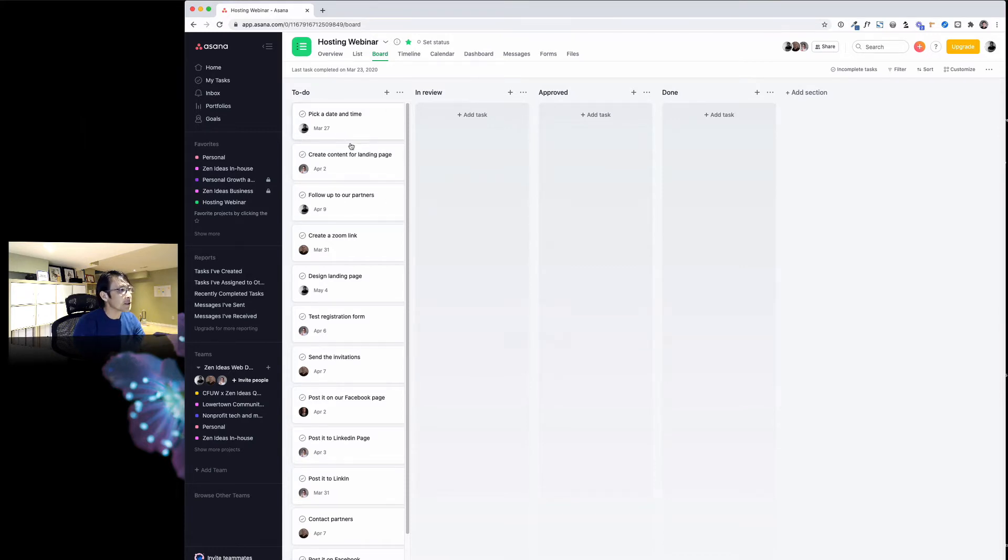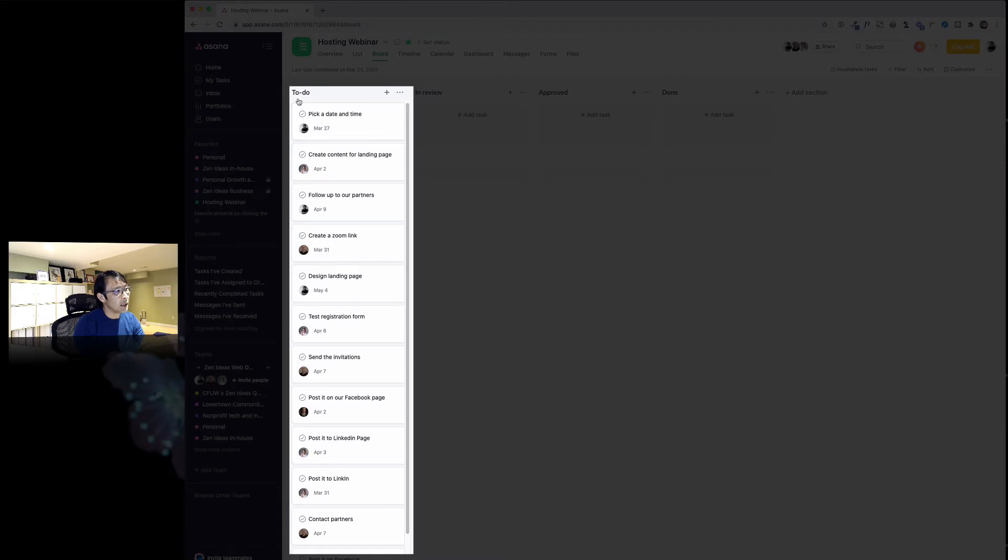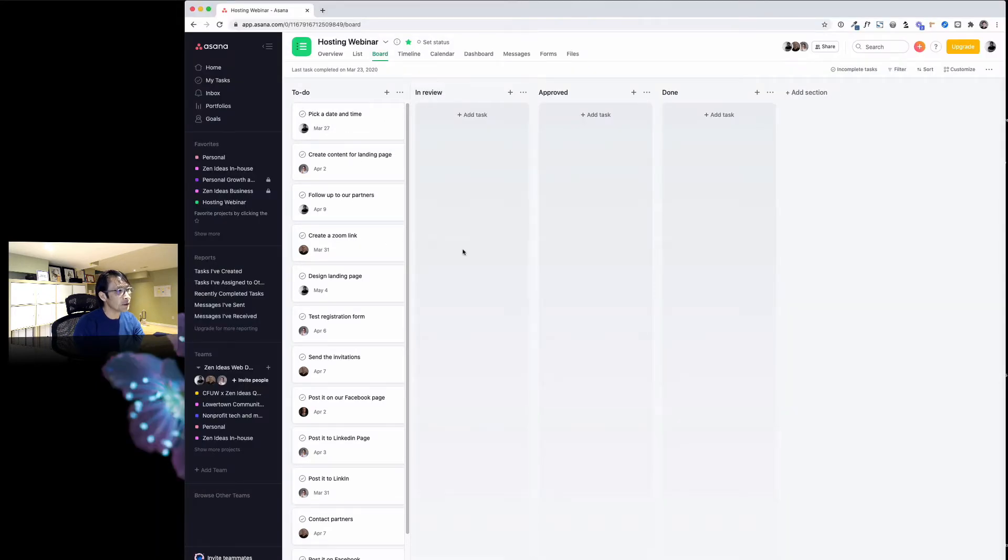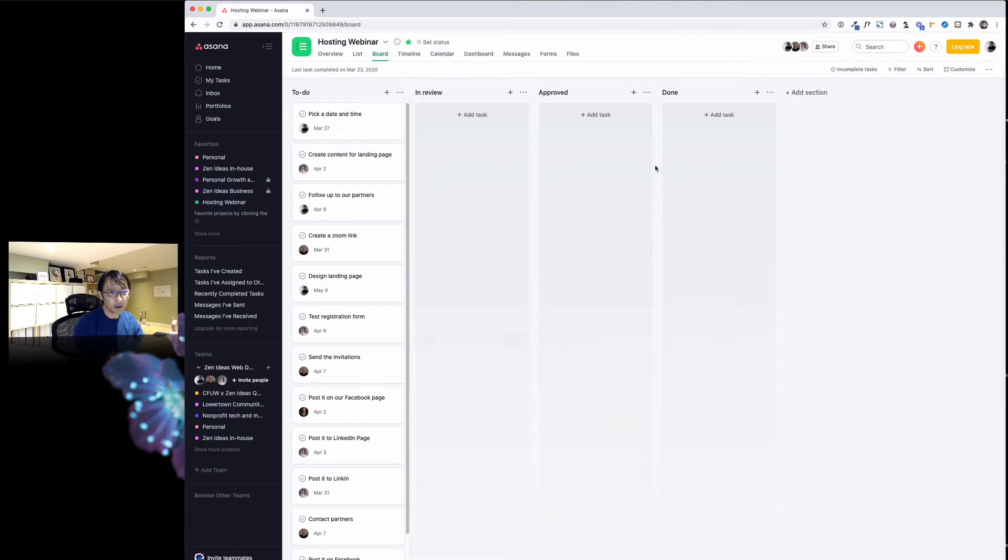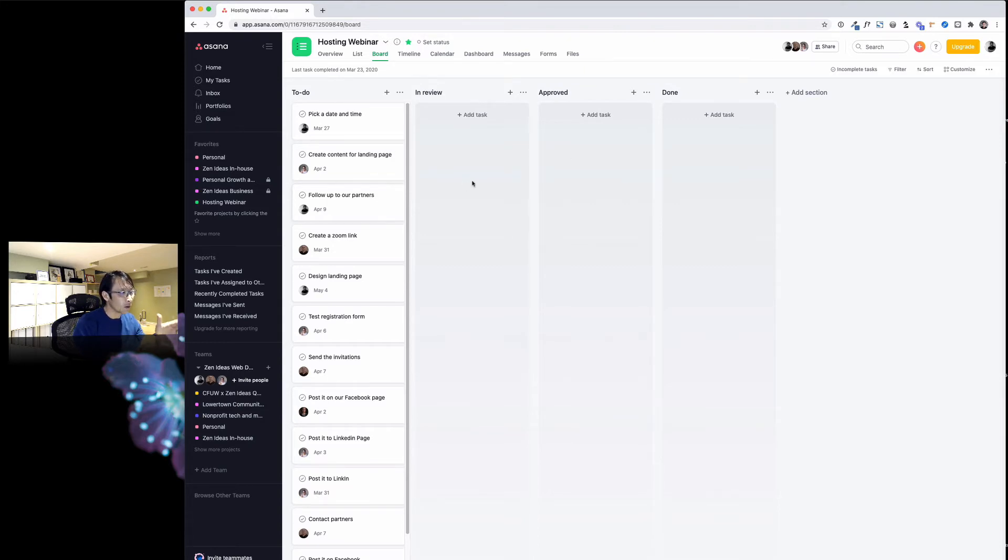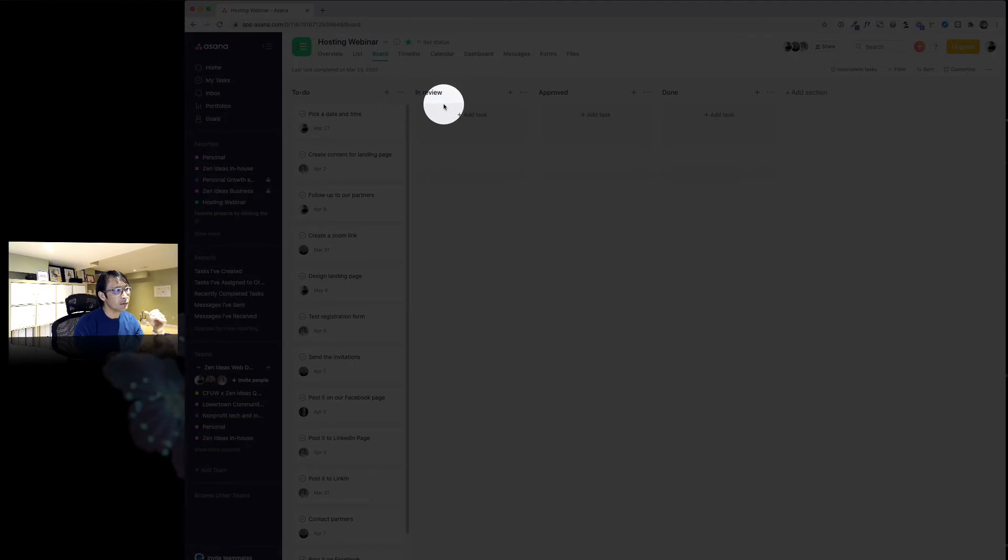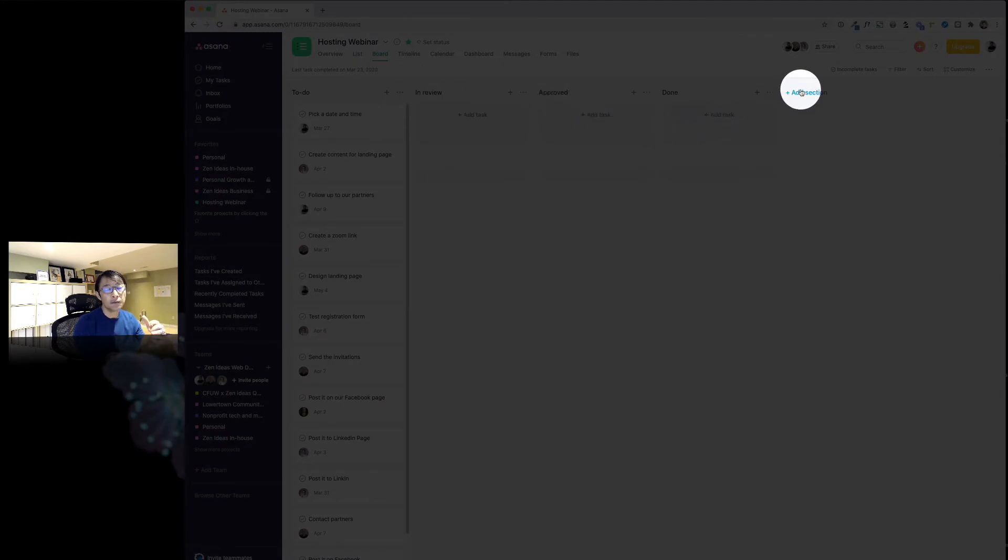I have four different columns—most of every project, whether this is a website project or coaching project, I have four columns. This is my template: to-do, in review, approved, and done. If you want to have another column, you can just add a new section here.